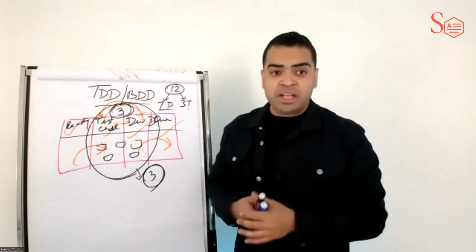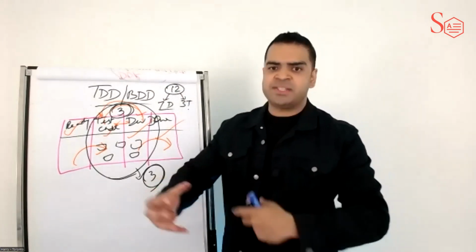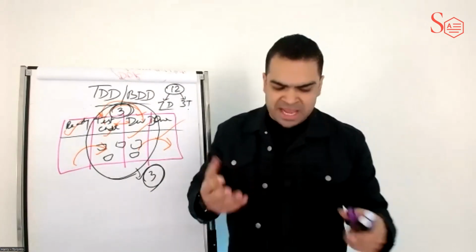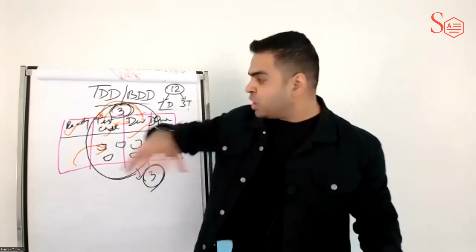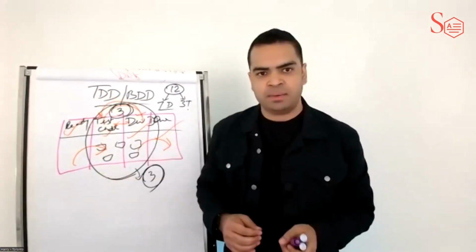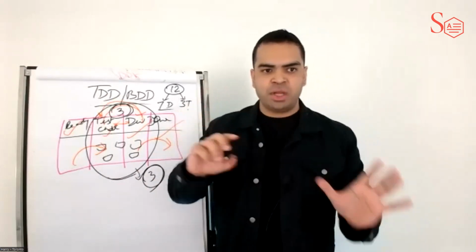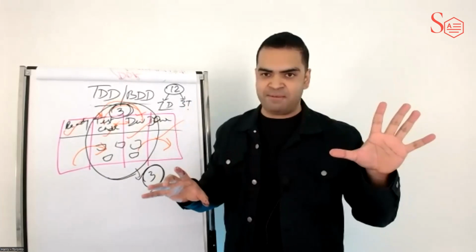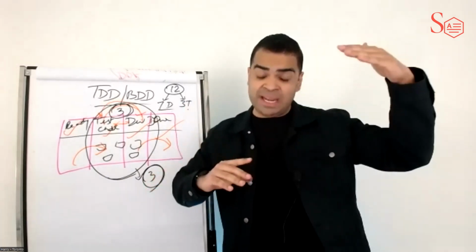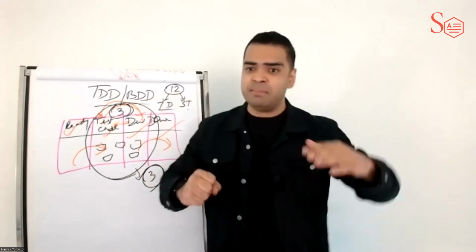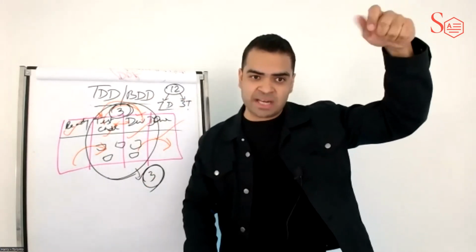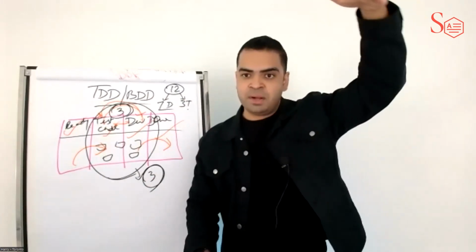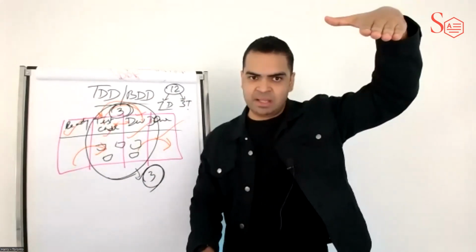Now, depending on the nature of how this team operates and how their stories are, Nelly might start with an initial WIP limit of 7, which is on average, there would be no more than 1 story in progress for every developer. Now, that is a very high WIP limit, but she has a big team, so that can be her initial starting point. So that's the guidance, that we start with the number of development specialists in the team.